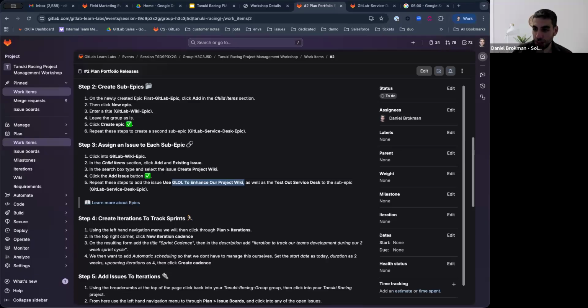I'll admit that the first time I tested it myself, I found it confusing. Which item goes where? It is a bit confusing. So even if you found that confusing, just please notice this, the goal here is to understand the hierarchy. You would need to create a top level epic, underneath it child epics that have some correlation to it, and each child epic must have some issues, which are the basic work items. That's where the user story is.